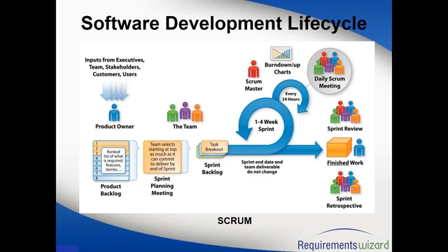But going back to the product owner, again, the product owner is somebody similar to your SME, who understands the issues, the problems, the pain points, and what needs to be done in order to solve them. Now, the product owner is typically one person, but it may be possible that you have a group of people playing the role of the product owner. Generally, I've never seen more than two product owners. Generally, one is best, but sometimes one person may not have the entire knowledge, so they may assign two people to play the role of a product owner. Now, you might question, where is the BA here?